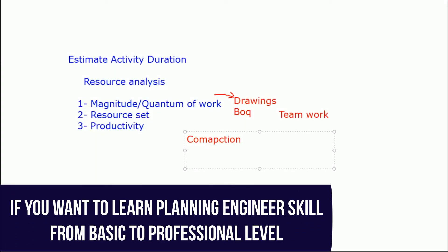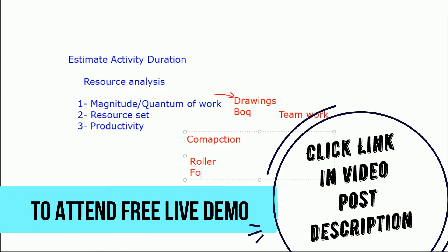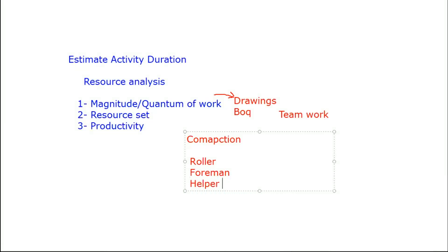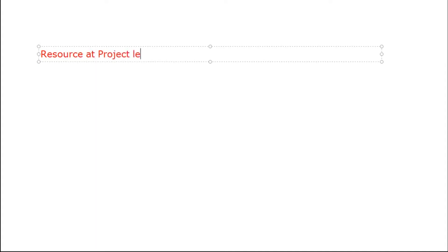For a compaction activity, you need to know what resources are required. For compaction you need: your roller (machinery), your foreman (manpower), and your helper (manpower). So three resources work together for this activity.